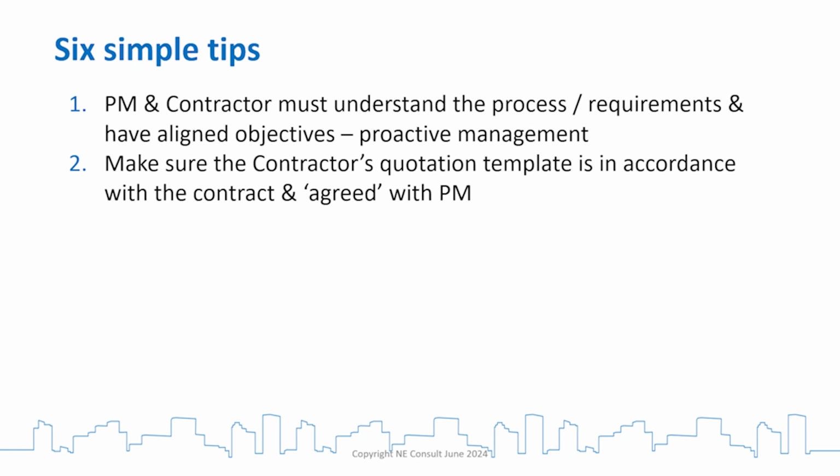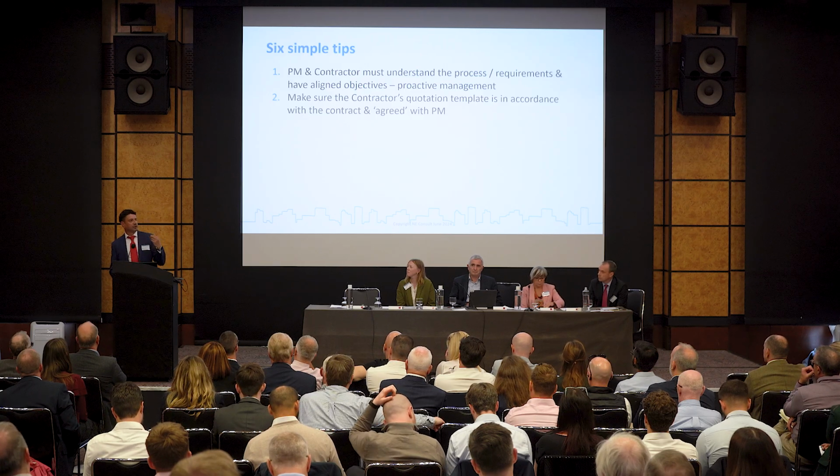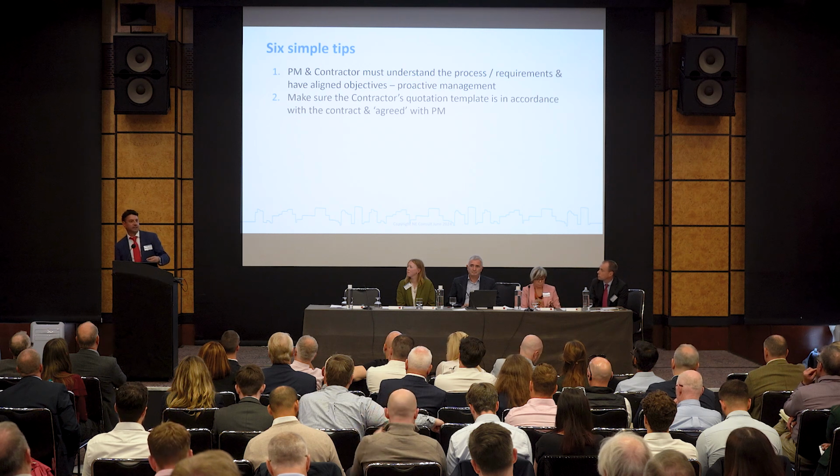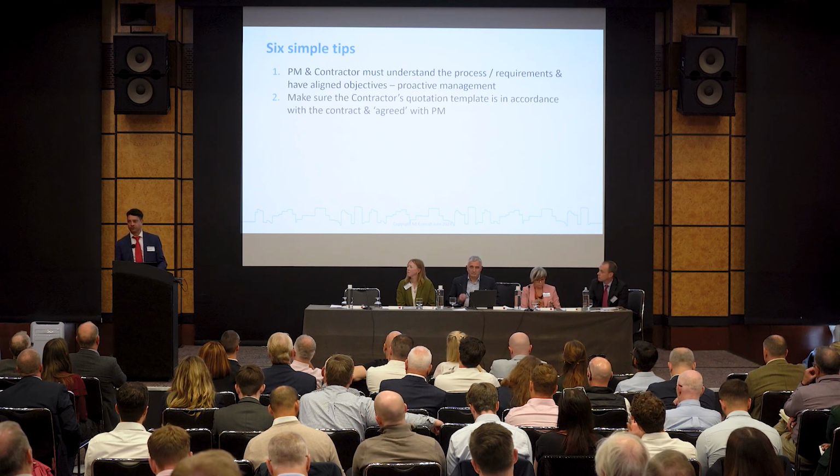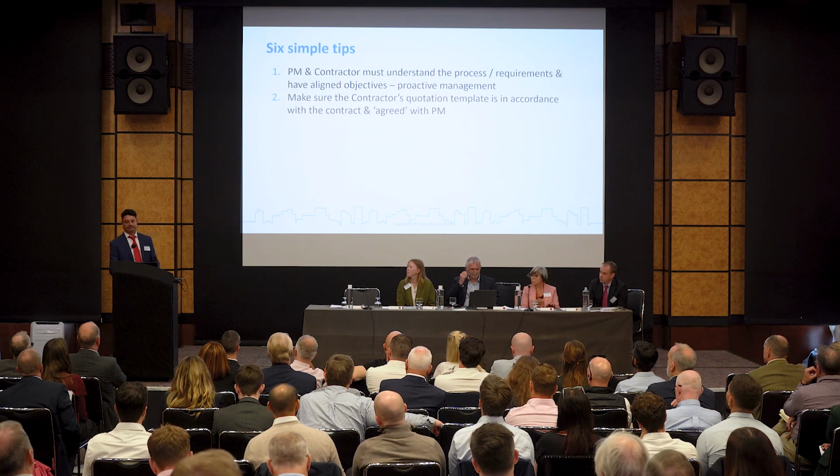Another one, make sure the quotation template is in accordance with the contract and agree with the PM. Just do it at the start, it's dead easy. The number of compensation events that get rejected that I see because the format's just wrong, that it's not being done correctly. Having an agreed template would help with that.